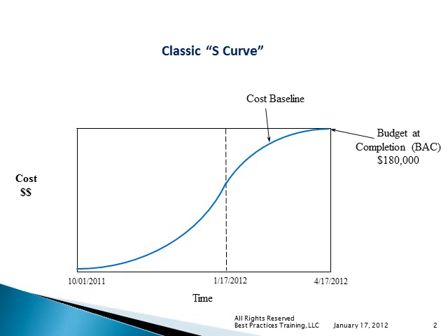So for the earned value practitioners, they would actually call this cost baseline, this S-curve, the performance measurement baseline. And it's really bringing in aspects of all 3 baselines all at once, isn't it? It's showing us what work packages are scheduled to be completed at what point. So it's aspects of the schedule, aspects of the scope are all being drawn in here, and what their cost estimates are at that particular point in time.